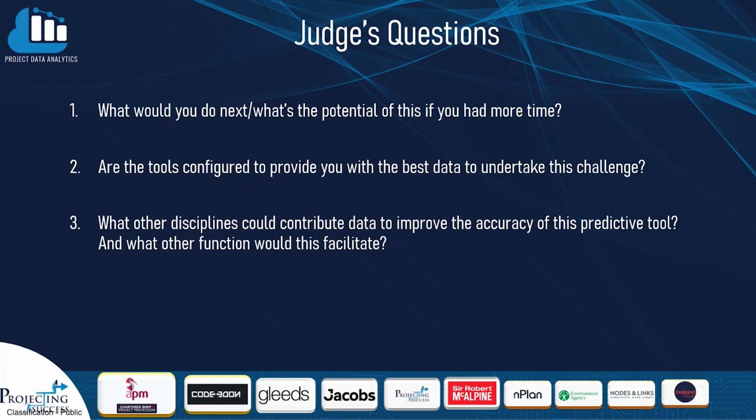It's not necessarily the tools that create challenges to undertake this project. As the data for this hack has spanned over the last 8 years, we found that some of the CISC's older data didn't correspond to the modern naming conventions or breakdown structure. This meant that there was a level of assumption within our project due to renaming of those categories. Additionally, the tools generally used for design and RFI management have only recently been able to be integrated or linked into other systems. This means that schedule, cost, change, and other data that can directly impact design hasn't been captured previously. Additionally, some of the data that would have been useful has been removed due to commercial sensitivity.